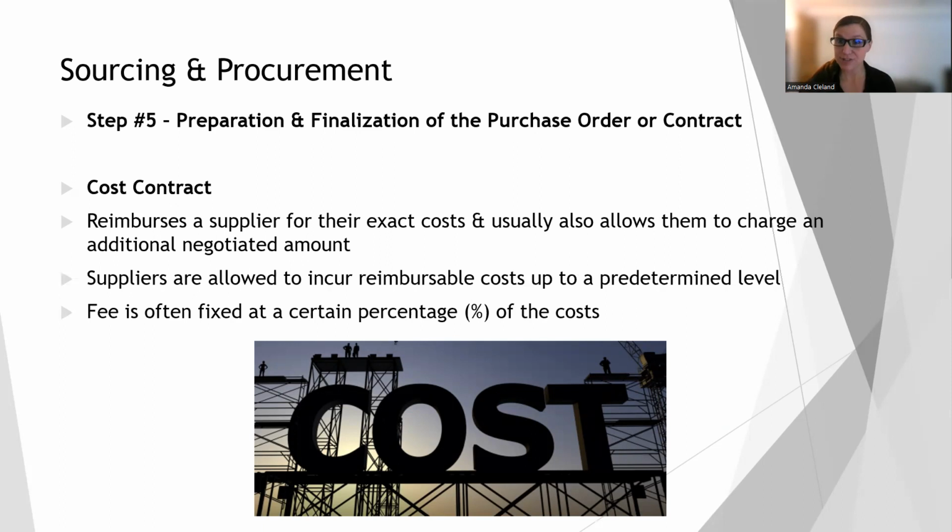So suppliers like this one because they're going to get paid exactly what it costs them to perform the service, to create the good and deliver it. And plus we're going to pay them an additional fee. So the suppliers prefer this type of contract.